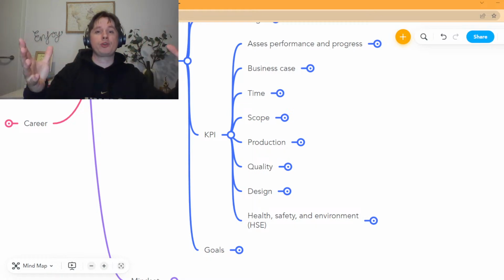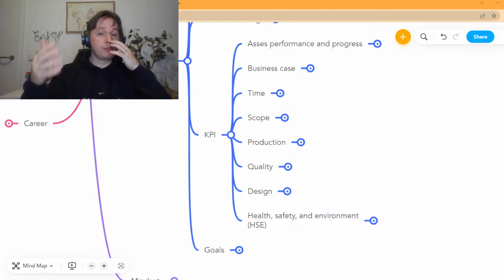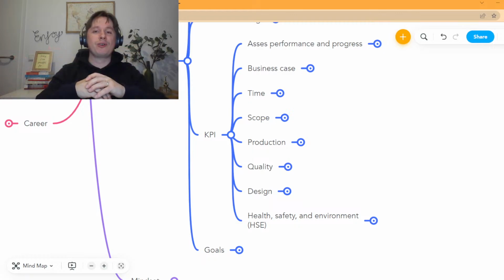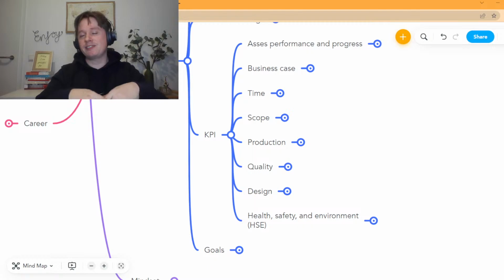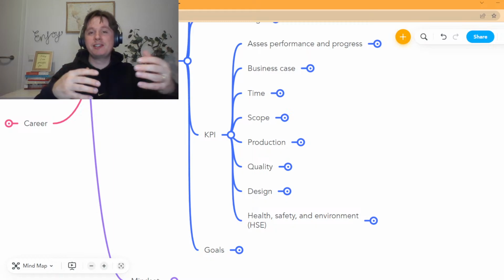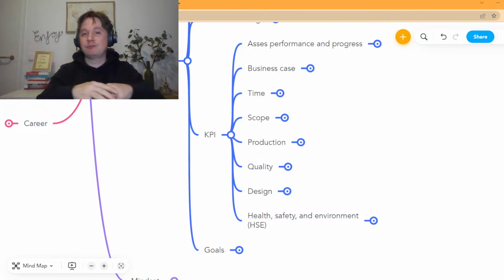Because even if you're using Scrum and you have a bit more flexibility on the scope, because you have a fixed release date, if you want to keep developing the product, you need budget. And if your sprints are delivering less and less than you were expecting in the beginning, that means you're going to need more sprints. More sprints need more cost. And if you already used all your budget, you need to ask for extra budget approval. That's normal in any type of company.